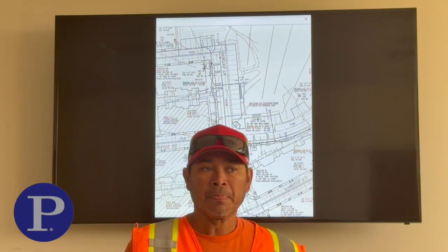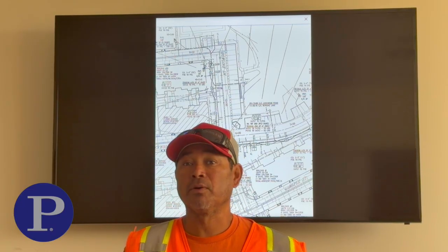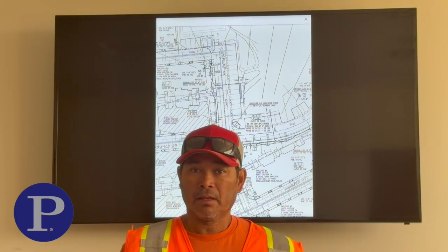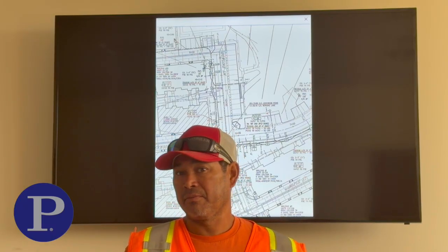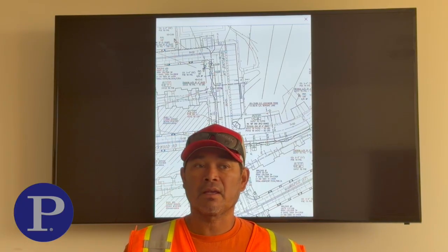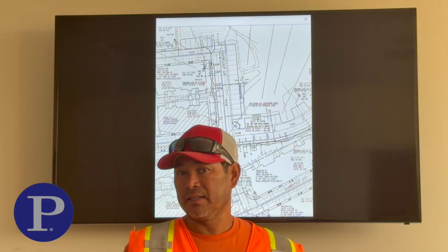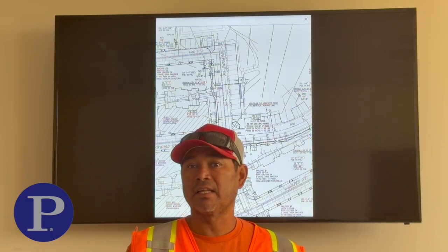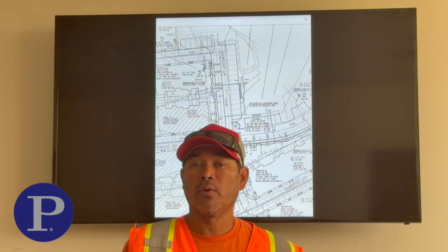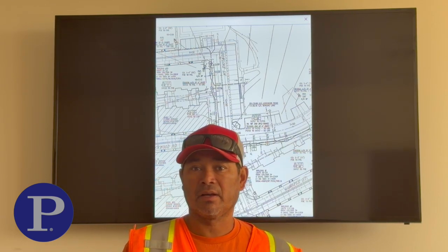Remember, when we pull 750 MCM cable, it's hard to pull. So every callout has to be modified by Edison, and that way they understand there is enough capacity, or they have to change the type of puller they're going to use, specifically when it's multifamily and it's a T cable they're going to pull.